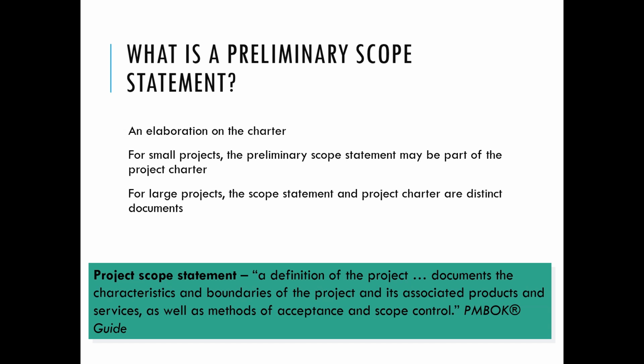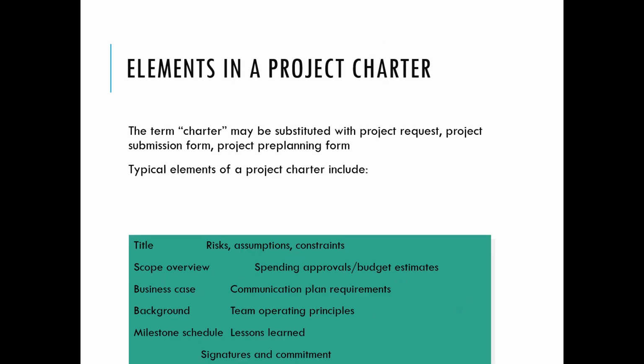Now, a preliminary scope statement is an elaboration of the charter. For small projects, the preliminary scope statement may be part of the project charter, whereas for a large project, the scope statement and the project charter are distinct documents. Some elements of a project charter include title, scope review, business case, background, milestone schedule, budget. Then there will be signature and commitment, some lessons learned, things that they should avoid, etc.